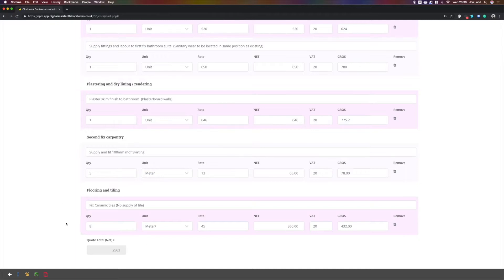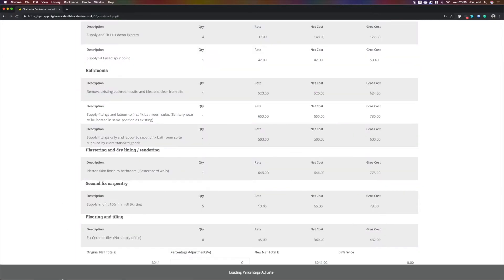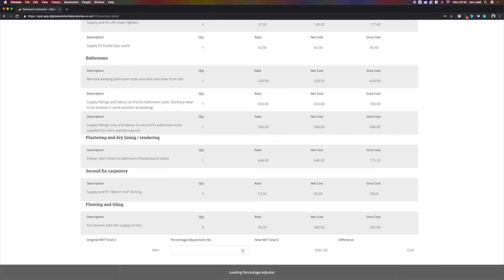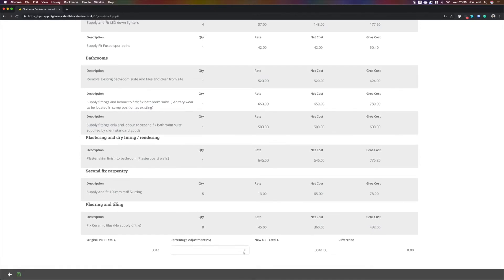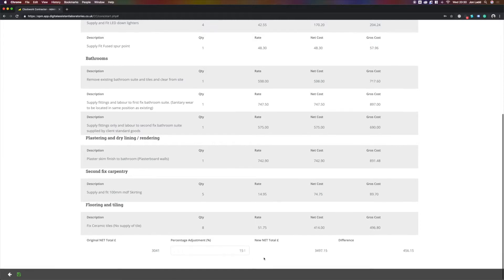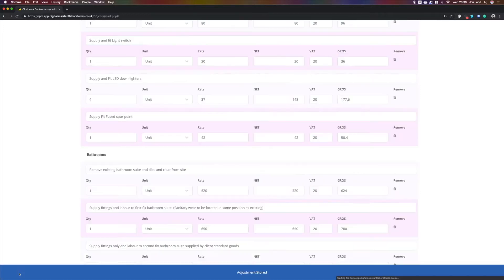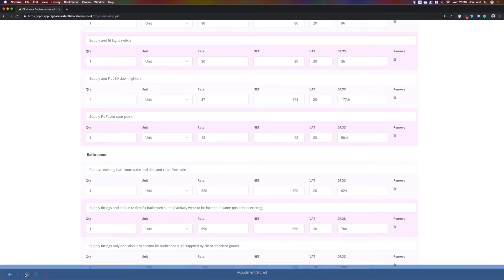Now, at the bottom left hand corner here, we can see a percentage mark where we would enter a contingency if we felt we needed to. The 15% in this instance would give us a contingency amount here. We save this, that is the quote saved.